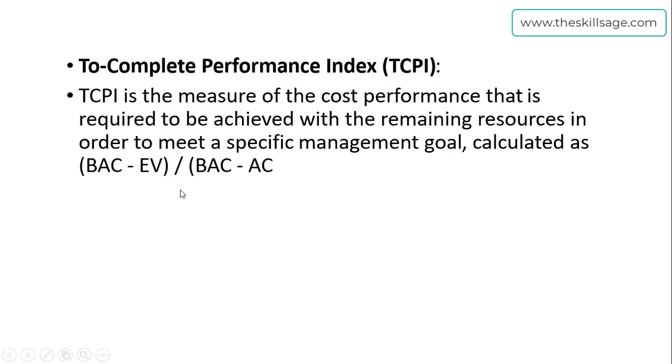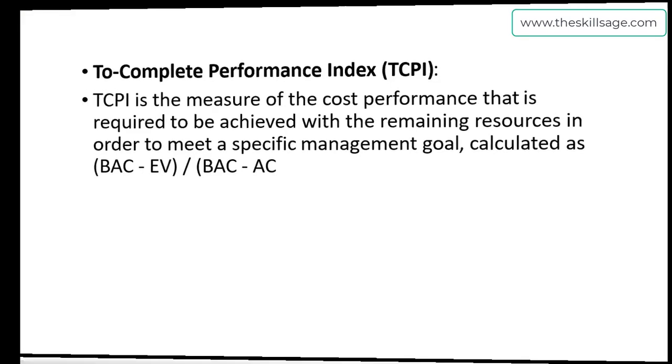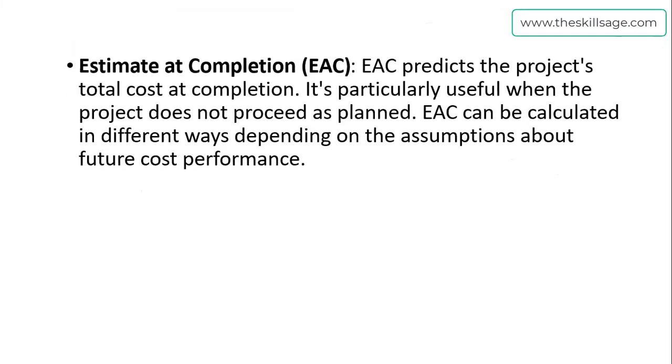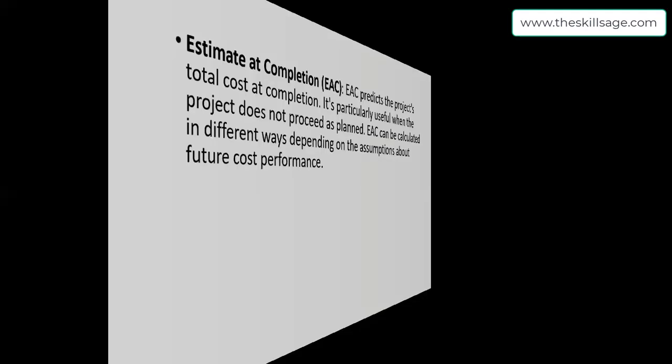Next is Estimate at Completion, EAC. It predicts the project's total cost at completion. It's particularly useful when the project does not proceed as planned. EAC can be calculated in different ways depending on assumptions about future cost performance. We have one planned cost in our project—when we are bidding, let's suppose we say in 100 million dollars we are going to complete the project. But when we proceed in an actual way, our project is not as per the planning phase, so we have variations. This factor helps us understand how much we are going to spend at the end of our project as per the ground realities on the cutoff date.